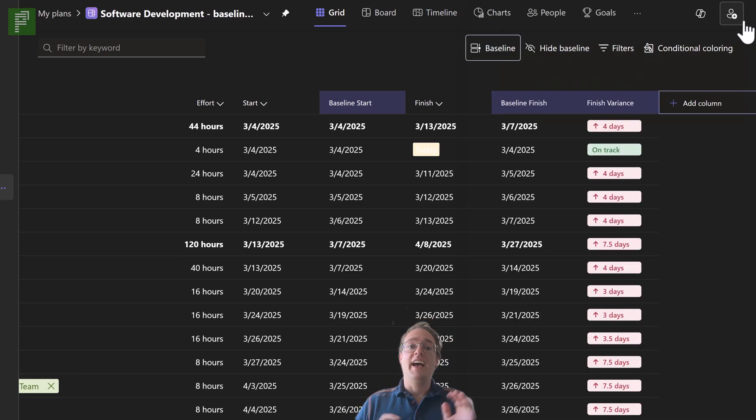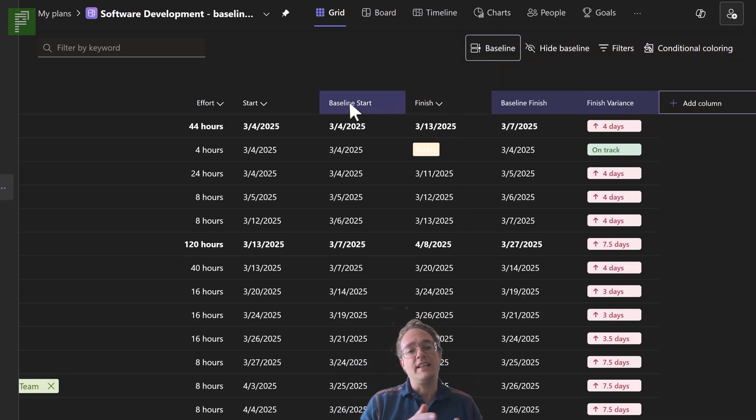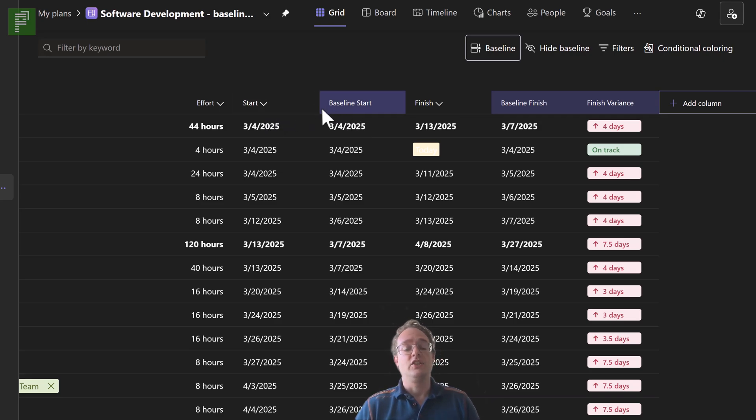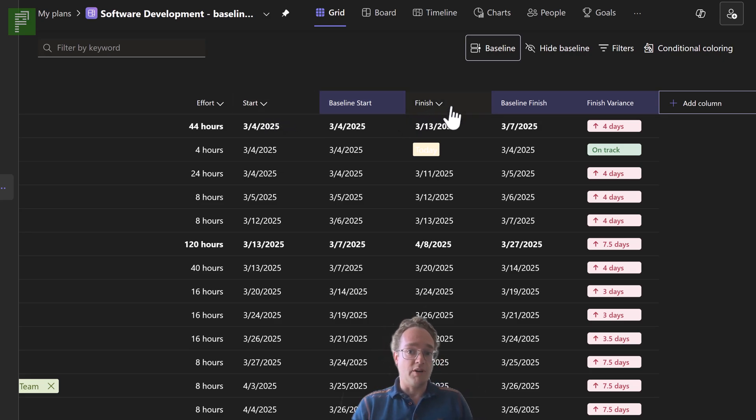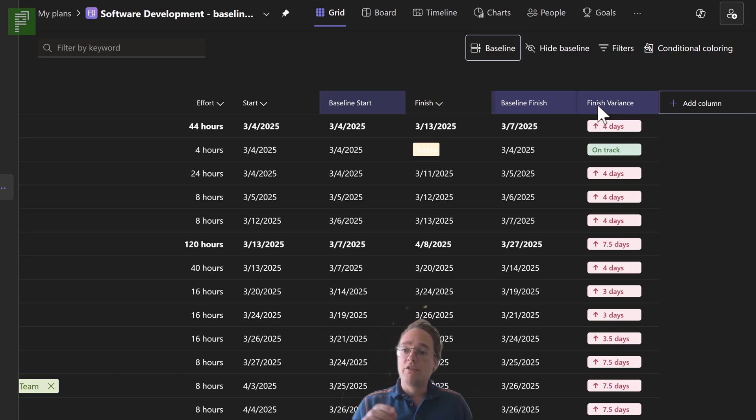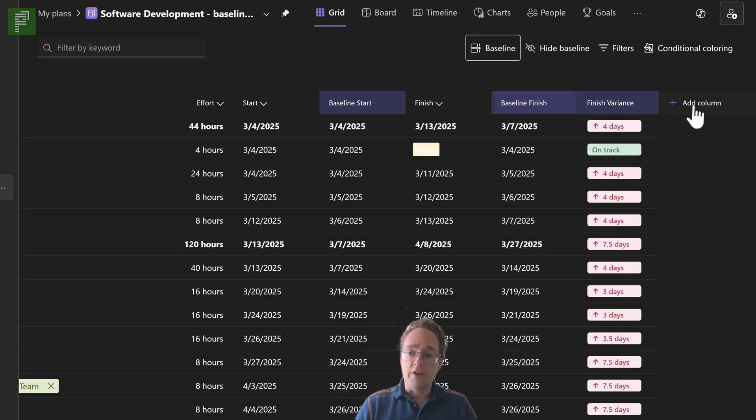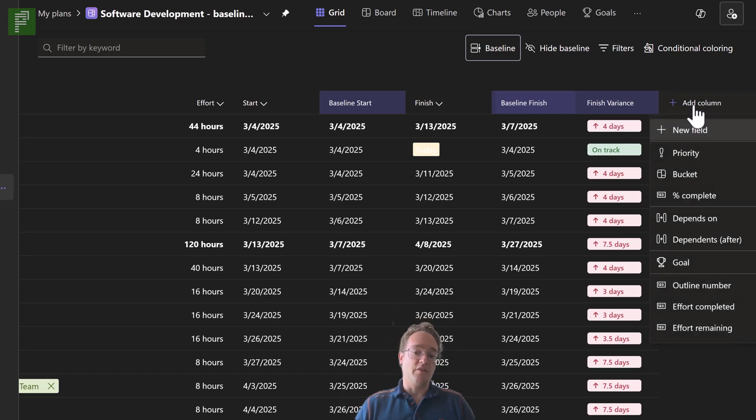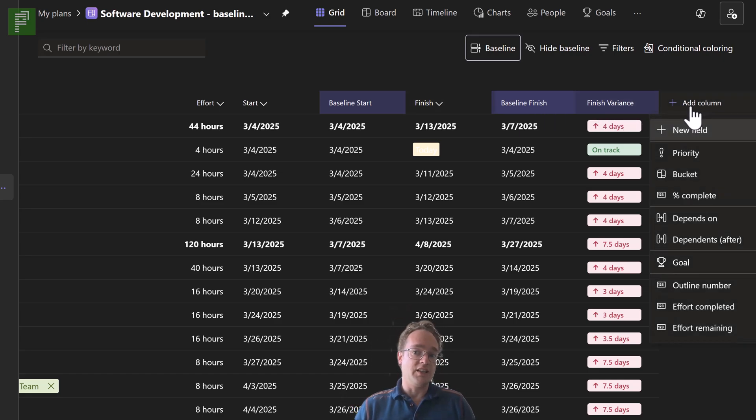Very good update. And this is very close to what we know as a tracking Gantt. So we have the baseline start, apart from the start, we have the finish and baseline finish, and we have the finish variance. Very nice update.